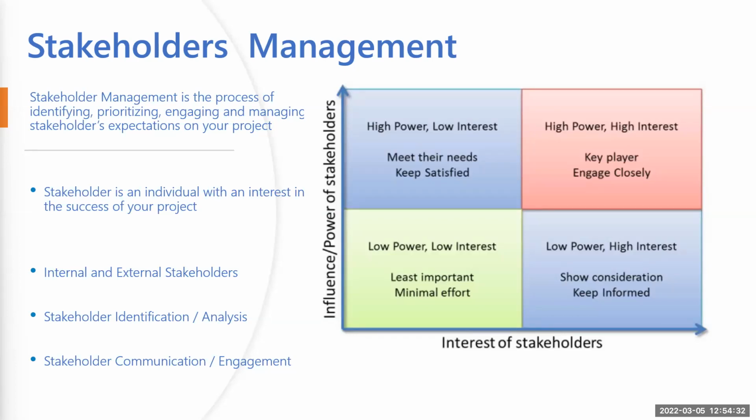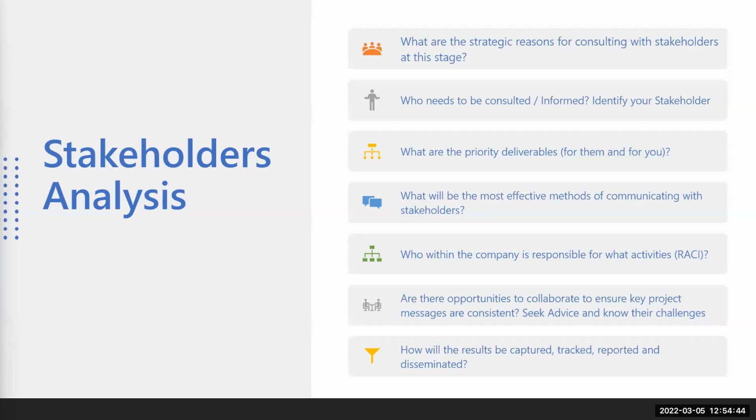And I'll come back to this grid. I've put some questions in here to say, what are the questions you should be asking them? It's not exhaustive, so you can have as many questions as you like. Just have them prepared before you meet the stakeholders. So what is the reason why you're engaging with the stakeholders at this stage? Is it to just get their opinion? Is it to just get to know who they are? Is it to just get to know their power of influence? The reason you're doing your analysis is that you want to understand their level of influence, their power, and what interest they have in the project. How is the project going to impact them?